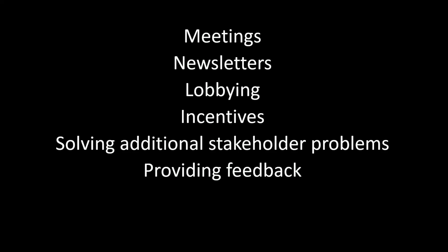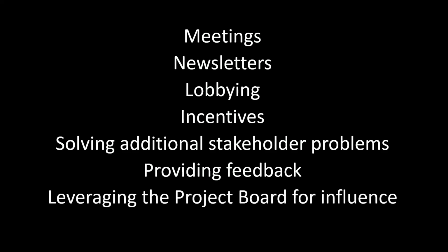And of course, do not forget about the project board. Remember, the project board, who are the ones who have come up with this idea in the first place, are often highly influential people, maybe a board of directors or senior managers. The chances are that they have contacts and relationships at a level where influence can have the biggest effect. So if necessary, make sure they are engaged, because they're your stakeholders as well. Make sure they're engaged and ask them for help in managing some of those stakeholders.